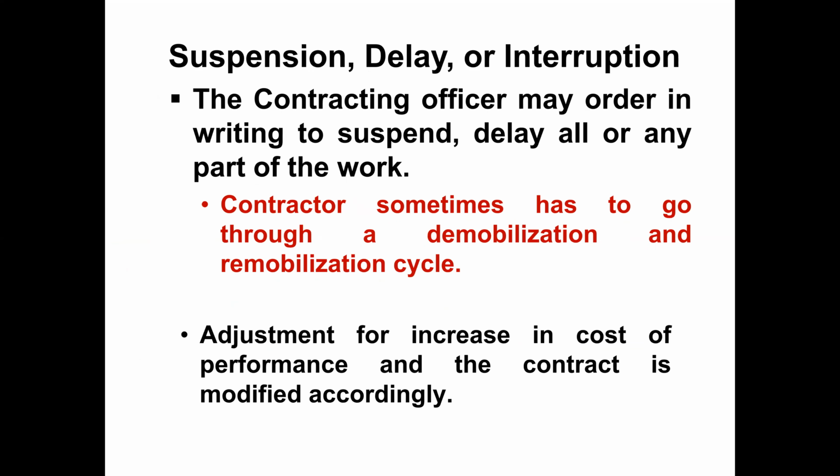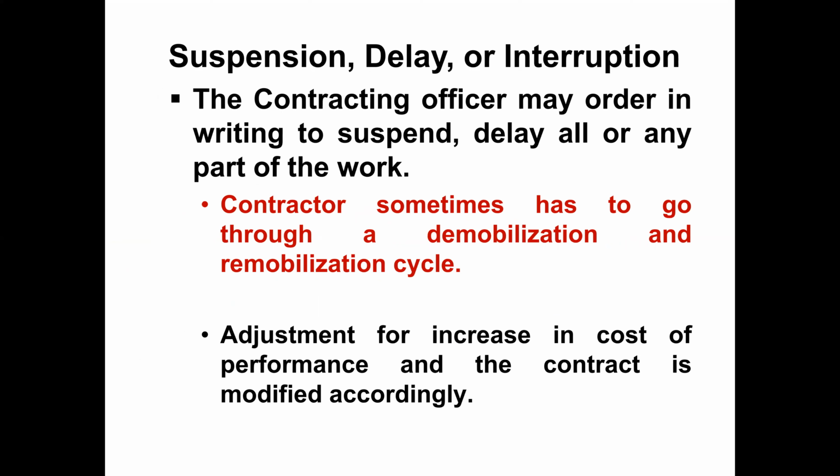So the next point we are going to discuss is issues during the construction phase. An important point is suspension of the project, or delay in the project, or an interruption in the project. The contracting officer may order in writing to suspend or delay all or any part of the work. Okay. So contracting officer means the person in charge from the owner side, maybe a project director or whatever the name is given. Usually in terminology we call it the contracting officer from the owner side.